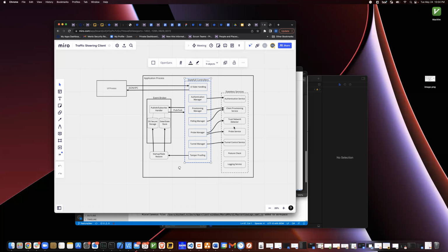If we say it's going to take so much time to do this and this, we do it next sprint, and then we get there and the server guys haven't done it yet, or they run into problems and it takes longer, we just have to adjust as we go, right? But we have to have some kind of a feel in greater detail than we have now. I know it's not going to be 100% accurate.